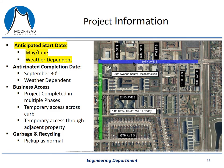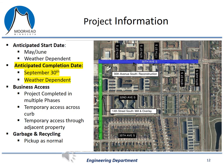The anticipated start date for this project would be sometime in May or June. This is a large enough project that I'm expecting the contractor to want to get an early start, but it'll be dependent on the contractor's schedule and weather. We will likely hold a pre-construction conference in April, and at that meeting we will get a construction schedule from the contractor and will know approximately when they want to start. At that time, the city will send out notifications to all property owners along the project area. The completion date for this project is September 15th — that doesn't necessarily mean the street will be in a state of construction the entire time; it just means the contractor has that window to complete the project. The project will also be completed in phases, and each phase will have a specific amount of time allotted for construction.